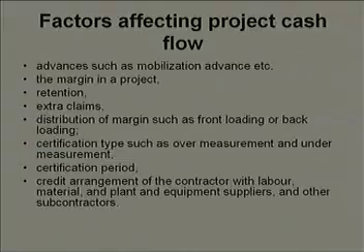Then the important point, certification period. What is the time taken by the owner or his representative to clear your bills? That also plays a role. That is called certification period. You will find that if the certification period is quicker, let us say between 1 to 2 weeks, you will have less problem of cash flows as far as the contractor is concerned.